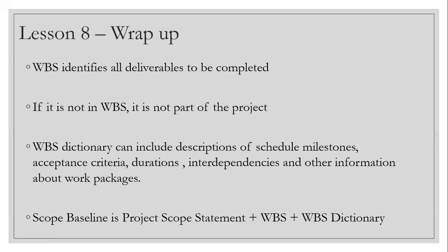All right, with that, we came to almost the end of the training. Let's do a wrap up here. First thing first, WBS identifies all the deliverables to be completed. Do not ever confuse the WBS to be activities. It is not. Think about them like the stencils in the work front, but they are kind of blank. The activities are yet to be pumped in when we get into the activity stage of planning.